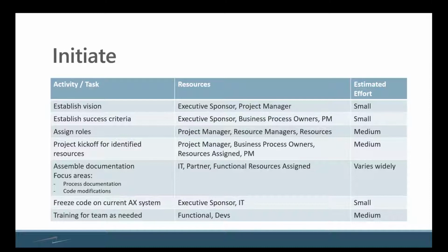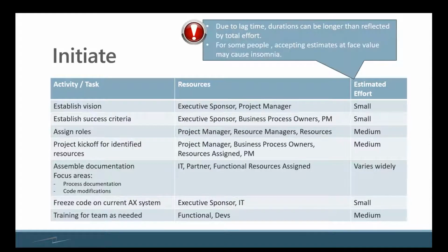There is obviously an impact on your existing system that needs to be considered, for example, by freezing code when you're going through an initiate process, because what you're trying to do is ensure that you have a static environment as much as possible to reduce the risk of changes causing that upgrade path to be jeopardized or to add risk with it. So this is part of the initiate process that we talk about, or our base camp that we use to tackle that.